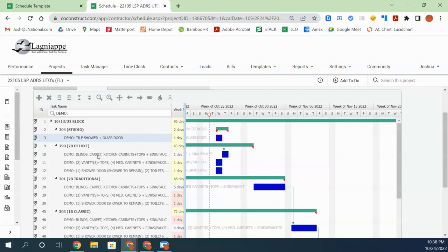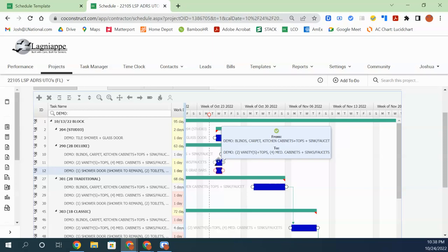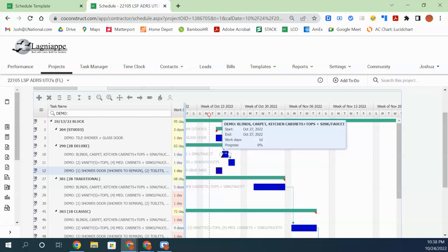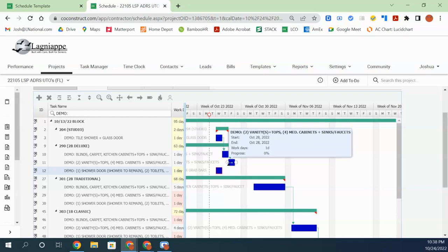This unit, I believe, we've got each of these as a 1-day item, but it won't take 3 days to do all these. It might take 2 days. So we'll connect this one as a predecessor of this guy, but then these two might start on the same day.